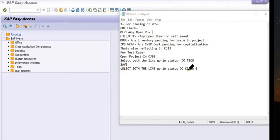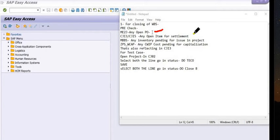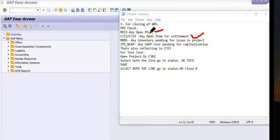For the pre-check, you have to use the transaction code ME2J and check for any open purchase orders. If there are any open purchase orders, then kindly close them before trying to close the WBS. You can check this open item in CJI5 and click on the open item line item.